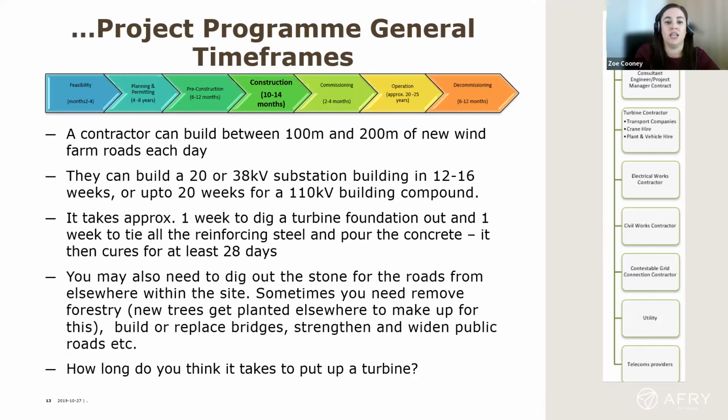In terms of the actual construction of the turbine components, that's up to the foundation, and when all the turbine components are on the site and set on the side, the crane is brought to site and the crane starts to construct it. It would generally take around a week, assuming that all the towers are lifted up, usually 3 to 4 towers per turbine, depending on the turbine size and the supplier. Then we'll have the nacelle up on top, then the hub, and then the blades installed. That roughly takes a week if we're in decent weather. If there are extensive wind delays, if the wind is too high to lift components, that obviously impacts that, and it'll take longer.